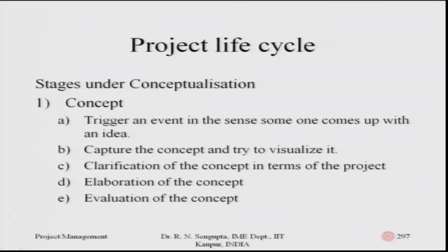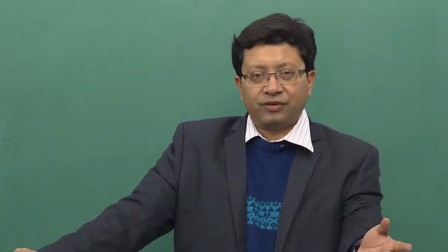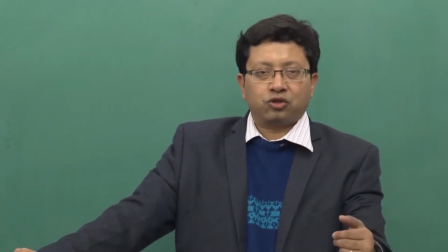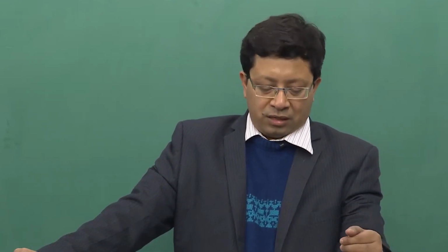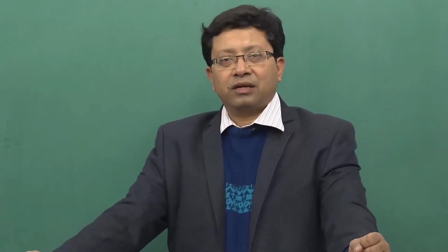And after that, once the consideration phase is done, you have found out how your ideas, or the project ideas, can be propagated with respect to practical things. Then you elaborate the concept in its field: how it can be implemented, what the variables to be considered are, what the cost implications and time implications are, whether it is feasible, whether it is technically feasible, the social implications, social impact, and environmental impact. Then you evaluate the concept with respect to all the criteria, and then decide and end the conceptualization stage.